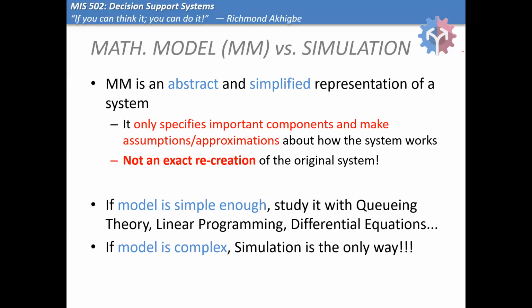The fundamental difference is CPM deals with what you call deterministic systems, and PERT deals with randomness, we call it stochastic systems. So the time in CPM is just a fixed time. In PERT, you say most likely, optimistic time, pessimistic time. Have you talked about that yet or not? Maybe not. Inshallah, you'll look at it.